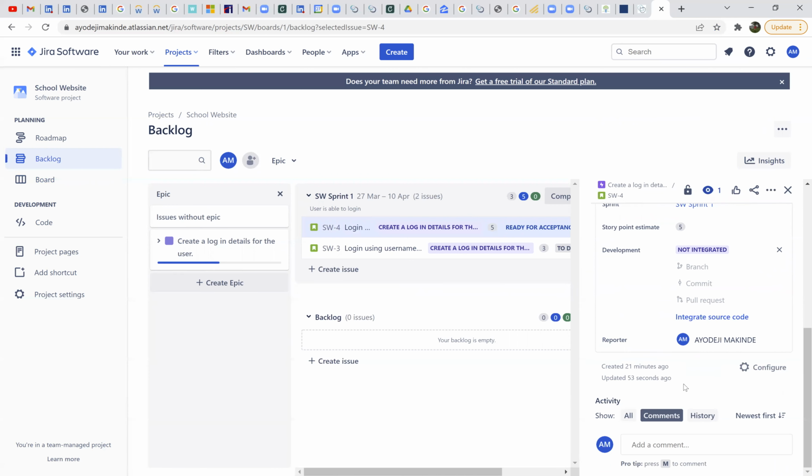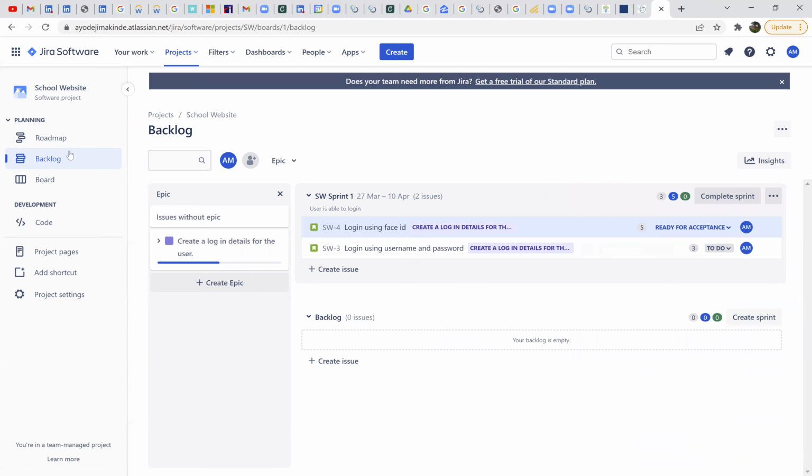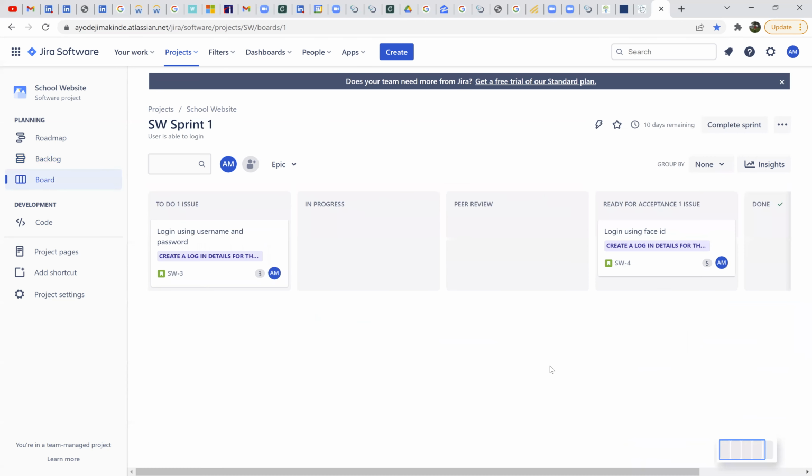You can add comments, which is a best practice too. Whatever you're working on, you can say, okay, I'm having a blocker here or whatever. And if it's blocked, on the board you can always create a column like blocked, so that when you have an impediment, you just move it into blocked. So everyone knows that it's blocked, and you, as a Scrum Master, can see how to remove that impediment. Right. So I have exactly 1 minute to go, but essentially, this is all you need to do.